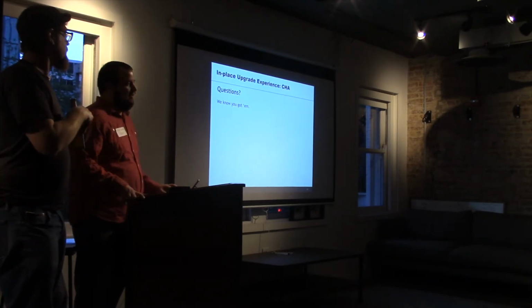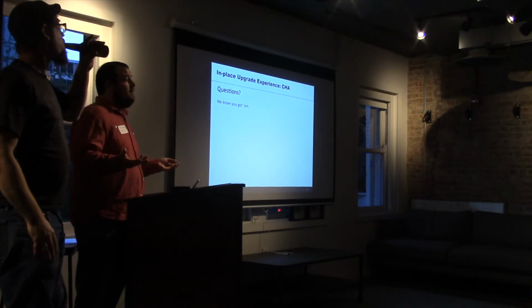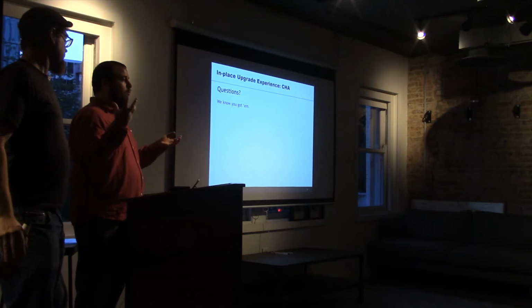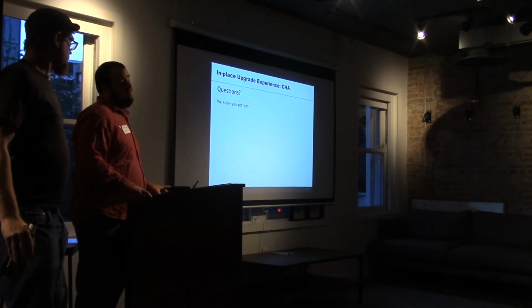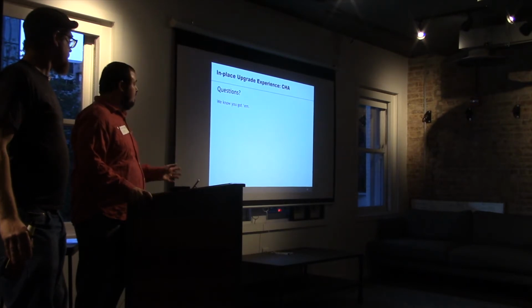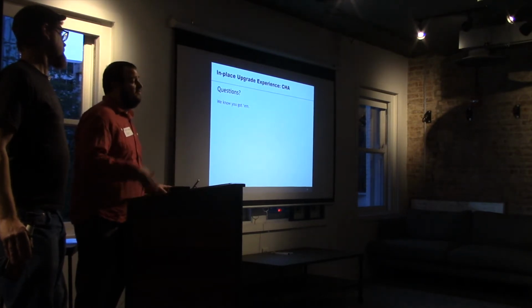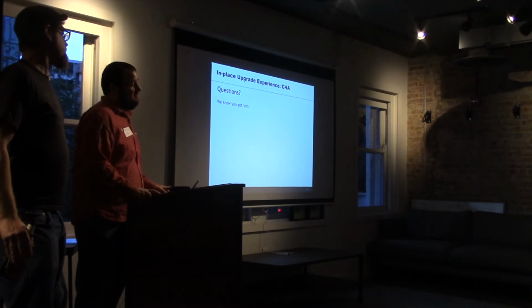That's a great point, Dean. And actually, one of the things we were doing was we asked Sitecore, how do we upgrade our modules? How do we upgrade Breakpoint? How do we upgrade EXM? And while we were waiting for the responses, we used the Express migration tool. And that's exactly what we found. We couldn't use the tool because we needed to upgrade the modules step by step with Sitecore. Specifically, the EXM was the biggest headache.